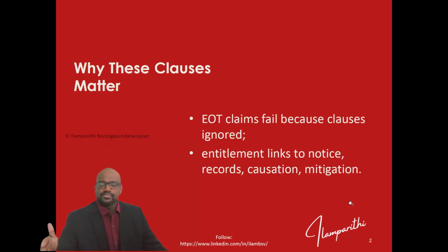For example, if there is a COVID and there is no suspension but still the work is going, and if you claim it under force majeure, you get only time. But if you are able to claim it under change in law, you get both cost and time. But there should be an actual damage for this proof. That is the actual evidence. So that is the next stage.